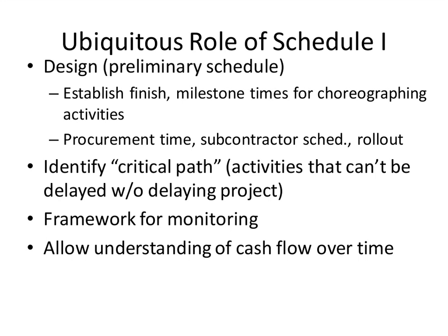And by project here, I'm talking, for your sake, about an incremental deliverable. So the whole incremental deliverable will be delayed if you can't keep a certain set of activities on track, whereas other activities often have slack. They have give. They're a little bit looser in their timing.